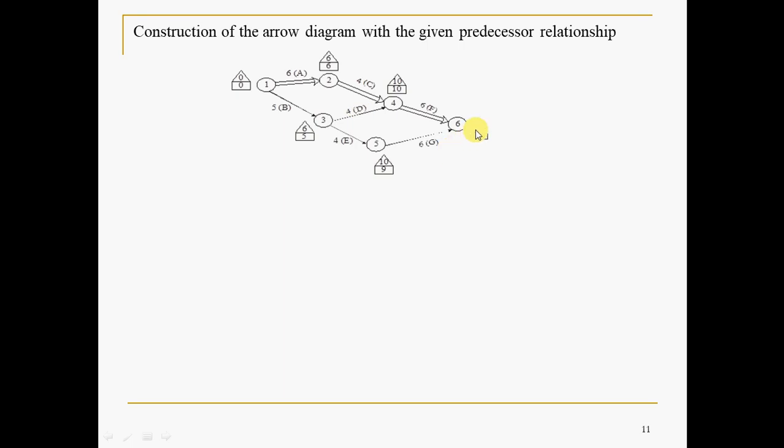And the triangle, backward pass. These two will be the same, 0, 0, 16, 16. While coming back, what to do? 16 minus 6. 6 to 5 can come back in only one way. 16 minus 6, how much is it? 10. And 4 also, 6 to 4 you can go back in only one way. 16 minus 6, 10. And here, node 3, you can reach back in how many ways? 2 backward ways, 5 to 3 and 4 to 3 also.